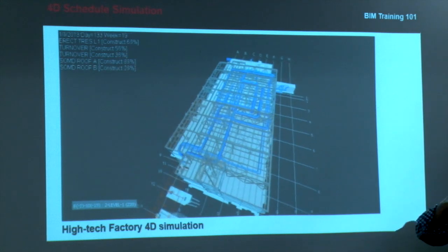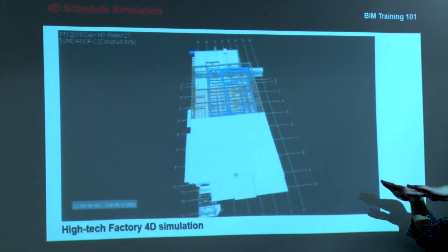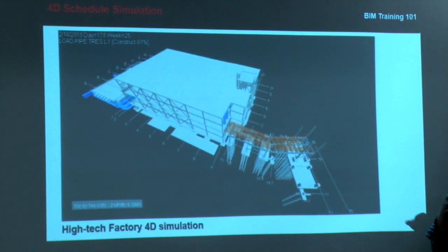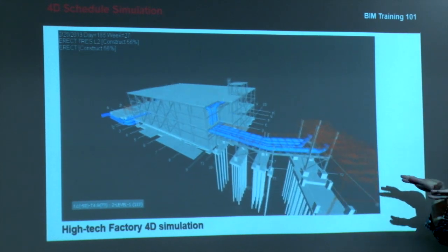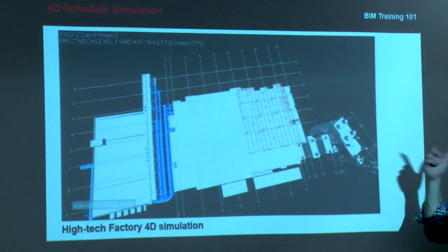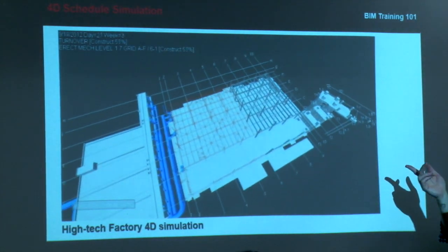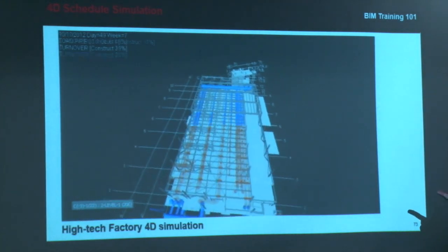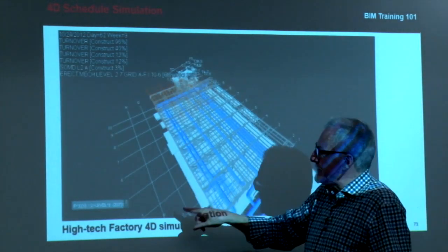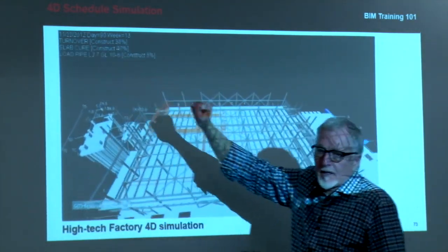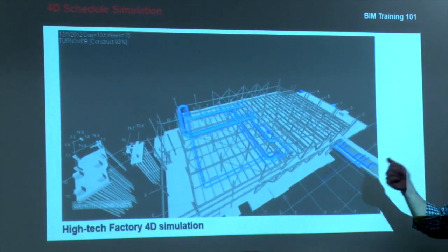and we were able to show them that you work in these zones, and then you flip and work in these, and while you're working over here, the duct and pipe is going in over here, and we did it so that there's never any downtime for the crews. They're all working all the time, and we got good buy-in. This went into our bid packages, so everybody saw our plan. They could plan for it, and it goes pretty fast, but you can stop this anywhere you want, and it tells you what date you're on right there, so you can see any day of the job.